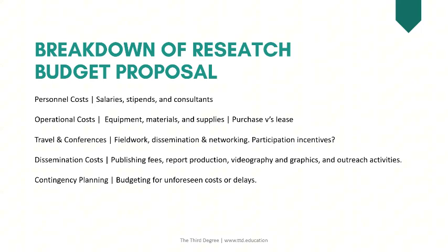Travel, what is the cost at today's either exchange rate or today's market prices, but also recognizing the last one, unforeseen costs or delays. Things change, so you need to have that contingency in there, maybe a 5% buffer in case airline costs go up, in case accommodation costs go up, in case rental for room facilities to hold a town hall meeting or something, if the costs may go up, as they do. So you've got to have that buffer.